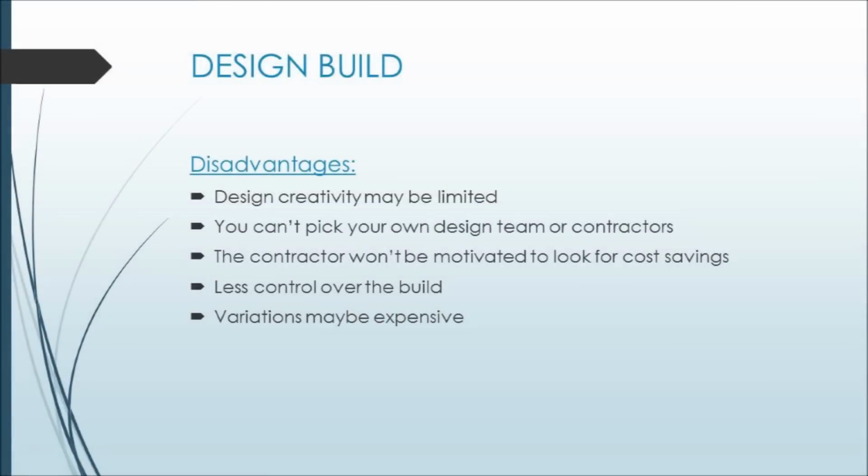The disadvantages of this method are that the creativity of the design may be limited, as you cannot pick your own designer or build contractor. This way, the contractor will also not be as motivated to look for cost savings, so he would just add an extra bit of cost on top. The contractor has the responsibility for the building, which gives you less control over the building, and variations could be expensive.